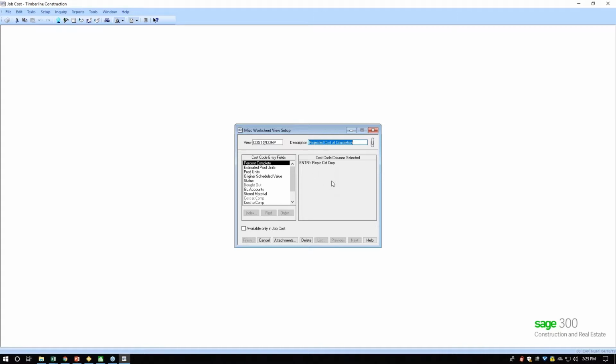Another way to put the value in is to put the delta. The current amount is 100,000. I'm expecting 20,000 more cost, so I'm going to put an add. It wouldn't say replace, it would add 20,000. I still get to 120,000. It's just how I think about it, how I use it.